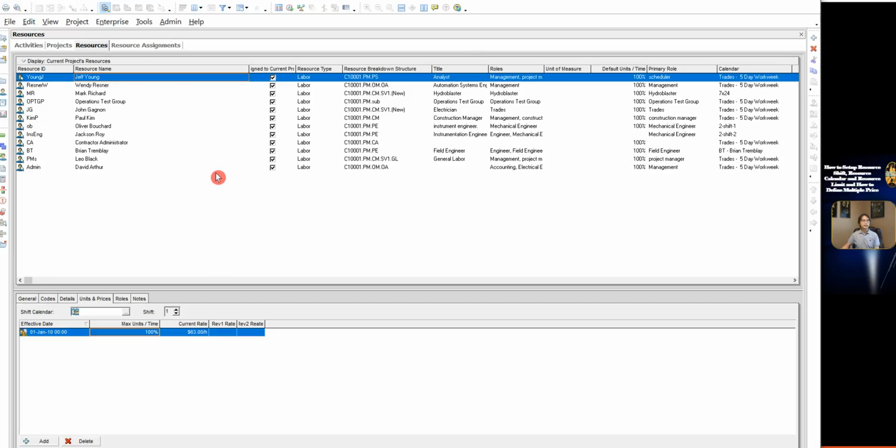We can use Max Unit Time to specify available quantity or limits for the specific resource. Setting limits will help you quickly identify where and when the resource will overload. When the resource exceeds the limit in the resource usage profile, Primavera will use different colors to represent limits and over-allocated units in the histogram.